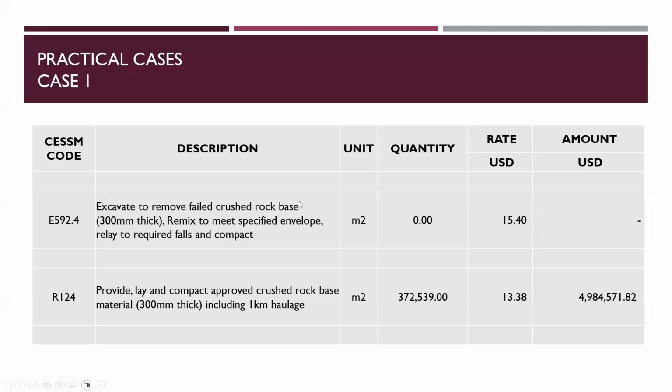But this instruction was issued to request the contractor to scarify the existing crush road base in place. And the certificate the contractor brought obviously was covering everything entirely. Meanwhile, he didn't pay any attention to the rate, neither did he make any effort to utilize clause 12.3 to obtain value for money for the client.